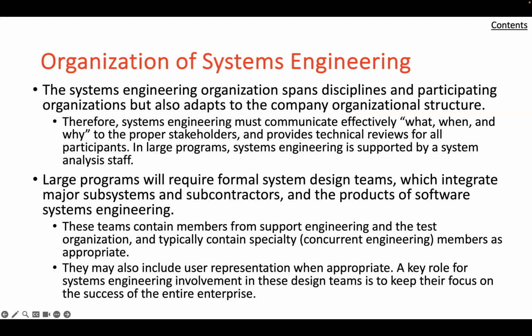The main variation in matrix type organizations relates to whether the bulk of the technical staff assigned to a project is physically relocated to an area dedicated to a project and remains as full-time participants through much of the development, or whether they remain in their home group areas. A related difference is the degree to which authority for the direction of the technical work assignment is retained by their home group supervisors.